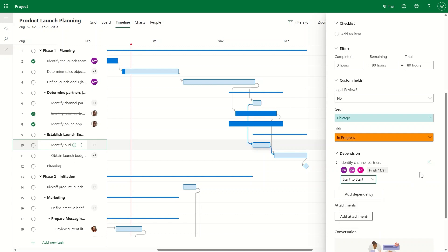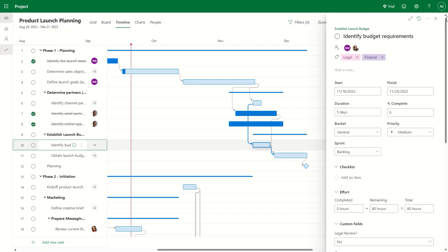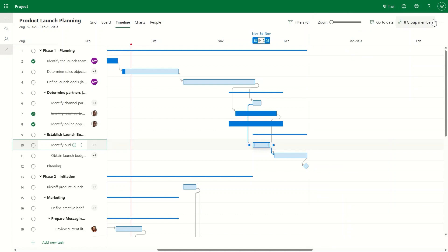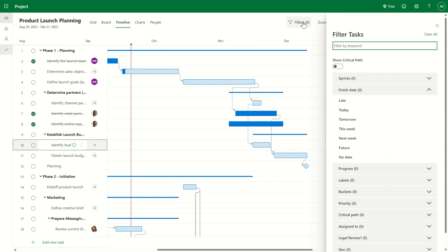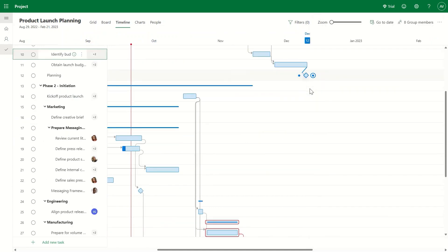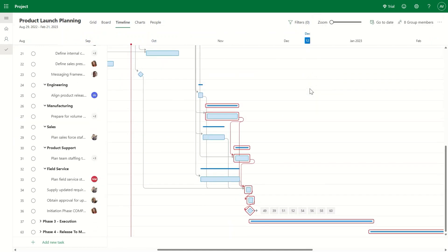Once you have those dependencies defined, then Project automatically calculates the time it will take to complete the work. And to take it a step further, with a click of a button, you can also view the critical path, which shows you the specific tasks that end up defining the finish date for the project.